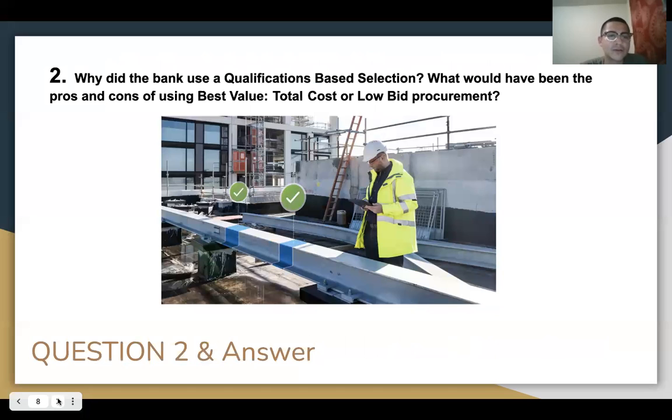Why did the bank use qualifications-based selection? What would have been the pros and cons of using best value, total cost, or low bid procurement? I said the bank decided to use qualifications-based selection because, as said in the description, premiums to accelerate the project are pennies on the dollar compared to the operational savings available to the bank, meaning that the bank had enough money that they didn't have to worry about trying to find the best deal to save money.